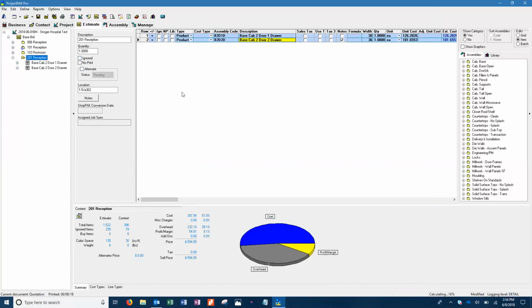Okay. And now remember, we can apply a spec at the very top of the job, at the base bid level, or at any summary level below it. If we do it at the very top, it affects everything, including a change order if we added one. If we do it at the base bid, it would only affect the base bid summary levels, not a change order. Sometimes crazy architects, you've got one room, but you might have 4 different colors in that room. So you can't do that at the room level. You have to make a different kind of subcategory in your room or something.